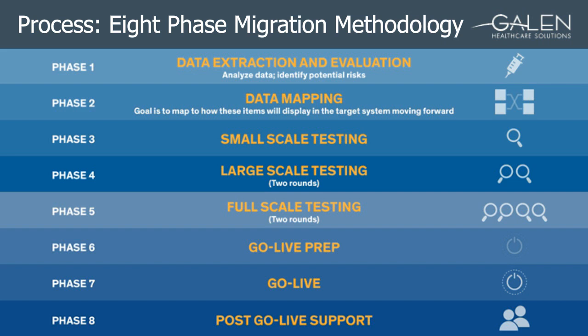Once the legacy system is switched to read-only, we will provide a gap or catch-up load to sync the data between the 2 systems. Next slide, please.